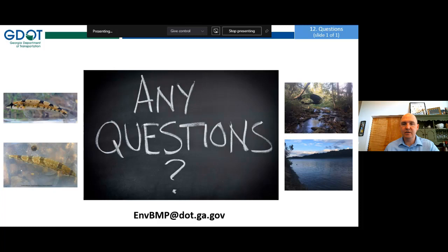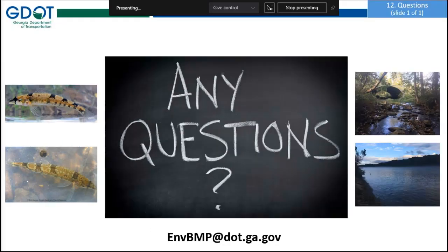All right. The next question I will direct towards Brad and Sarah. The Ecology Post-Construction Stormwater Report timeline with the A3M. Can you provide examples of the possible district construction and maintenance input? I could take that one. So we'd really like to get the conversation started with district and construction at that point. We don't necessarily have any input that we would anticipate, but we would like to hear anything that they know about the location, their experiences with post-construction BMPs, any questions or concerns that they might have, and possibly their availability for different levels of maintenance.